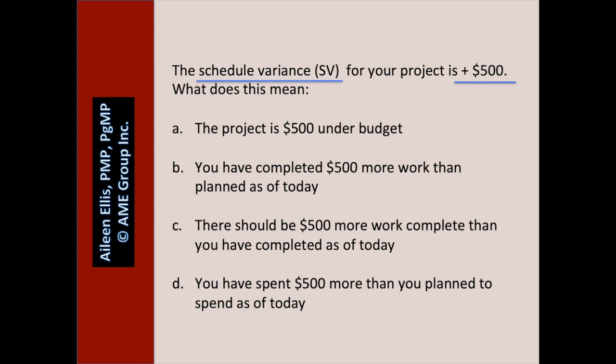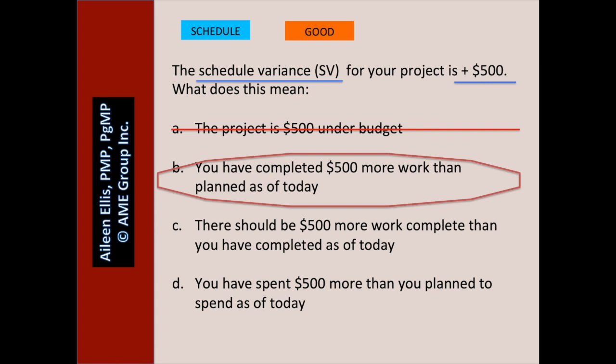The schedule variance for your project is positive $500. What does this mean? Pause the video and answer the question. Is this about schedule or cost? Schedule. Positive $500 — is that good or bad? That's good. So we're looking for a good thing from a schedule standpoint. A: the project is $500 under budget — no, we don't know because we don't know the cost variance. B: you have completed $500 more work than planned as of today — is that about schedule and is it a good thing? It is. So B is correct.